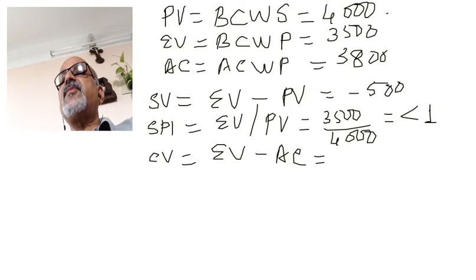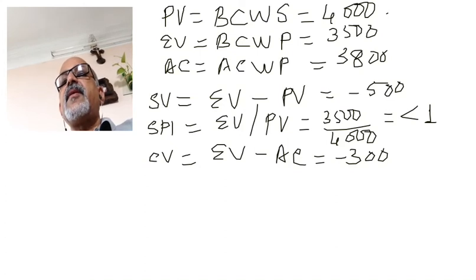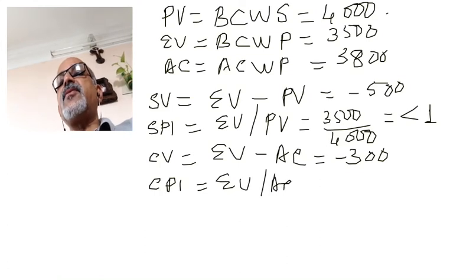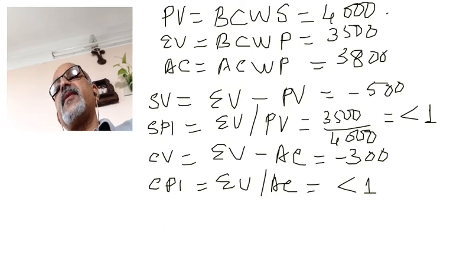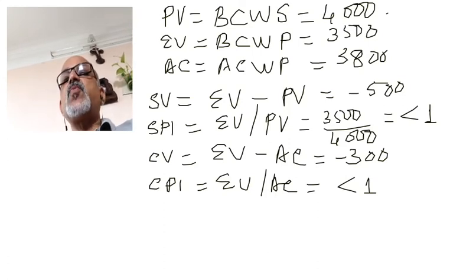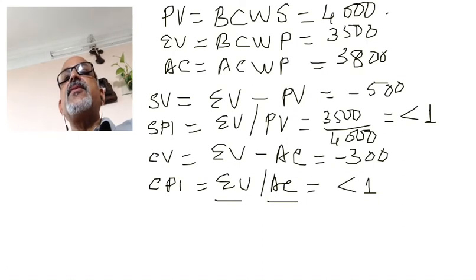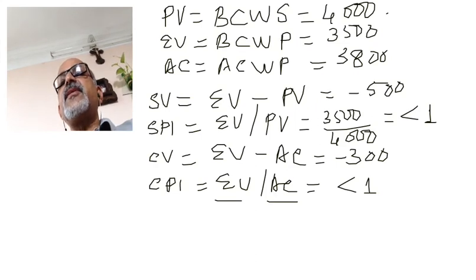Cost Variance (CV) = Earned Value minus Actual Cost = $3,500 − $3,800 = −$300. Cost Performance Index (CPI) = Earned Value divided by Actual Cost = $3,500 / $3,800, which is also less than one, indicating a cost overrun. If CPI equals one, earned value equals actual cost, meaning the project is within budget. If CPI is less than one, actual cost exceeds earned value and you are in trouble.